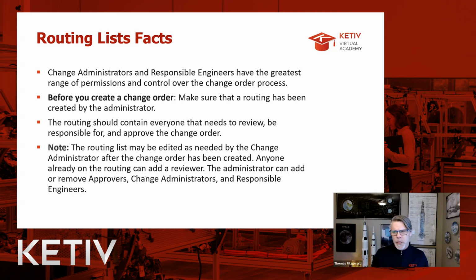So change administrators and responsible engineers, as I stated before, have the greatest range of permissions. So these are the two roles that you really want to give your power users, or those individuals that have a lot of control over what happens with change orders, okay? Before you create a change order, you have to make sure that there's a routing that has been created by the administrator. Now, out of the box with Vault, there is a default routing. However, it's just like a placeholder, if you will. There's not a lot of detail there.